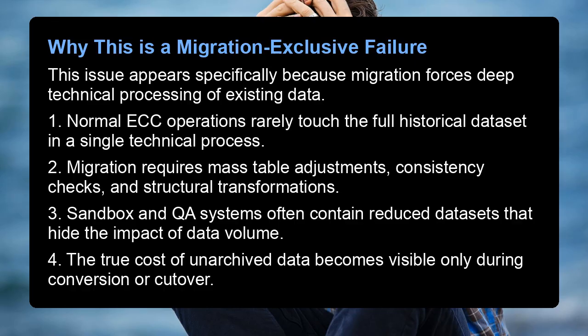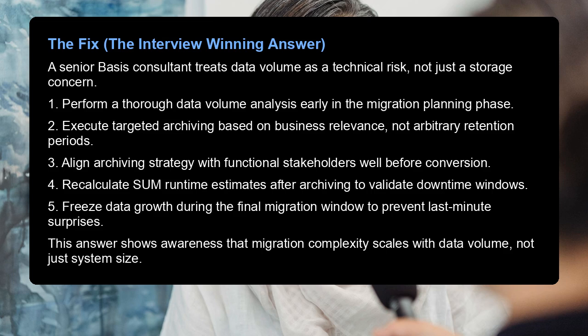3. Sandbox and QA systems often contain reduced datasets that hide the impact of data volume. 4. The true cost of unarchived data becomes visible only during conversion or cutover. The fix, the interview-winning answer: a senior Basis consultant treats data volume as a technical risk, not just a storage concern.